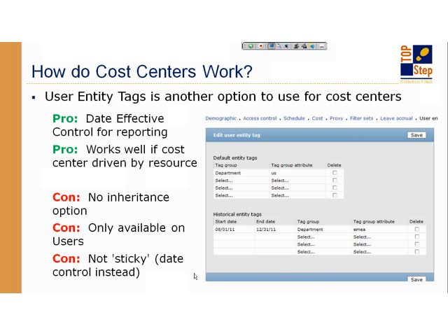The only other downside of using the entity tags is there's no inheritance. So basically, even though you may have, like I showed you, that task project user, so whatever the value is, I follow the cost of the person or the task or the project. The entity tags don't allow you to have an entity tag at the task level. It's just at the user level, and that's it. So again, it goes to your reporting requirements, how critical they are at the cost center level. If you have more of a user-centric cost center reporting, user entity tags may actually be a good way for you to go. If you have more of a project and a task-based focus, there are other options like some service levels that you could use that may work better for you. Okay.